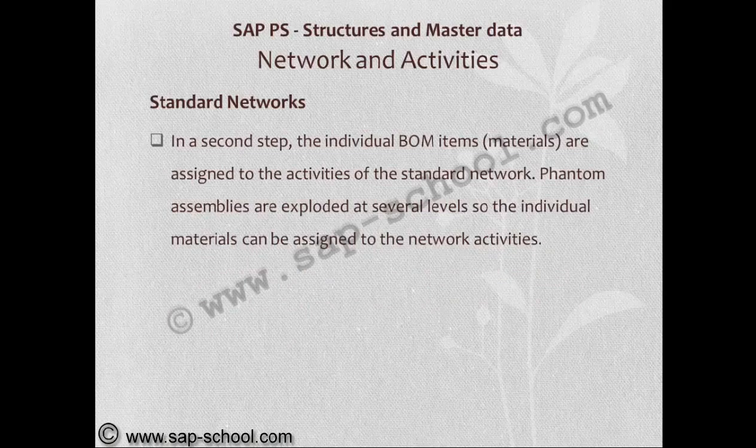In a second step, the individual BOM items are assigned to the activities of the standard network. Quantum assemblies are exploded at several levels, so the individual materials can be assigned to the network activities.